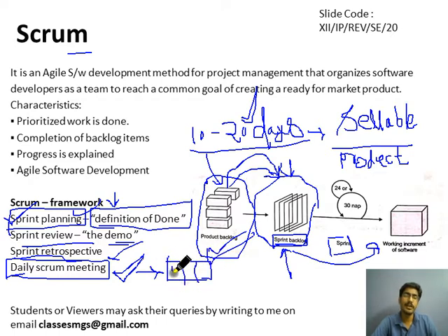First question is what he has done, second question is what he is going to do today, and third question, if there is any problem he is facing to complete the work in the specified time, and he needs some help, then this need will be provided by the Scrum Master and product owner to the developer team, so that the task can be completed in the sprint.